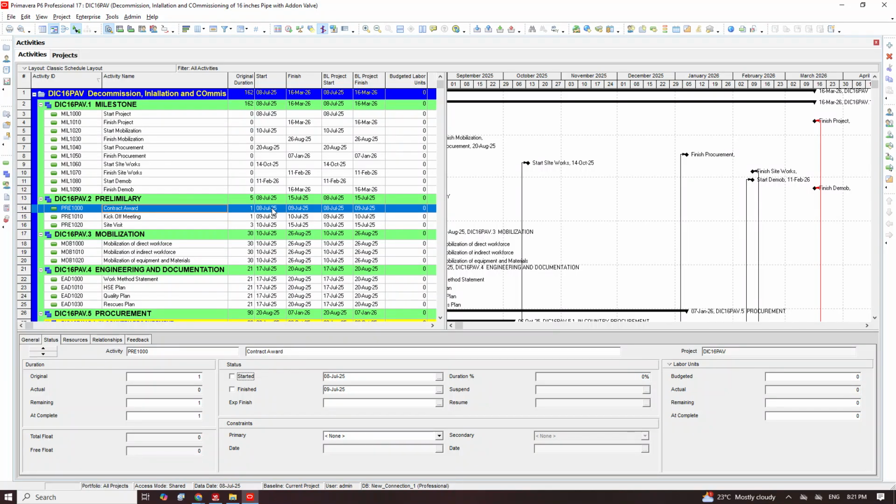You should note that whenever you have progressed it, it's not going to change again. It will remain like that. If you want to change it, you will remove all the progress you have updated, neutralize it to 0, then you do your change and update it again. So that's how we maneuver that.